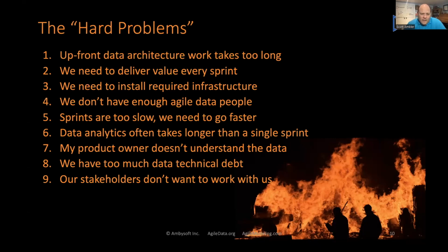The data analytics work takes longer than a single sprint. We're being asked to deliver every 2 weeks, yet we have 6 weeks of analysis to do to understand a data source. I've worked on teams where on average, it was 6 to 8 weeks to do the data analysis work, and arguably data science work, that was required to understand the data source that we were putting into our data warehouse and then reporting on. So there are some really serious time challenges here.